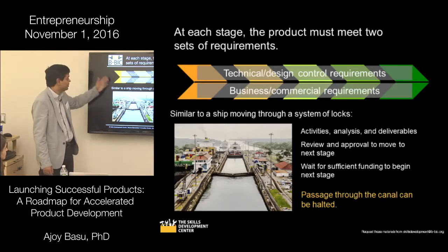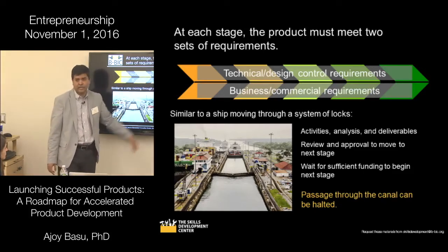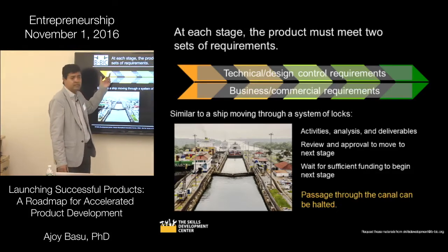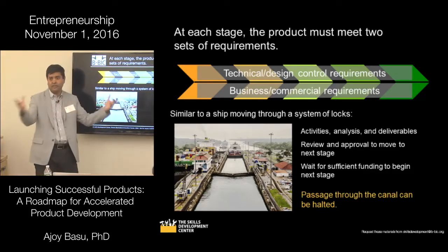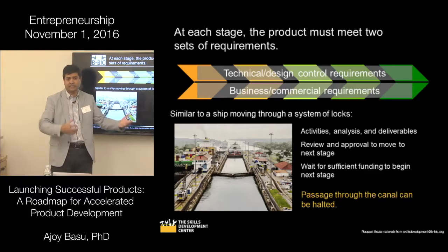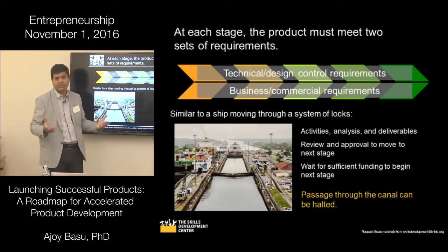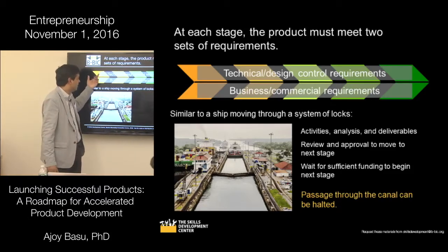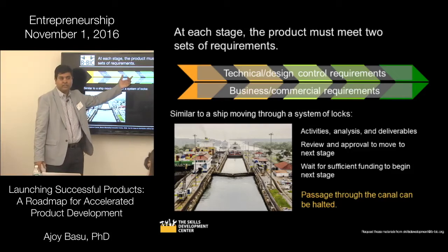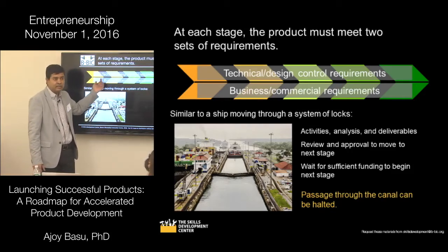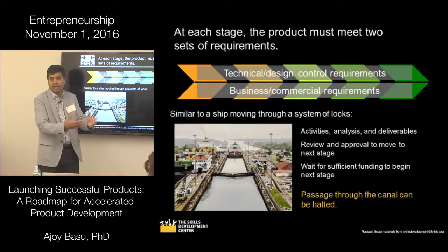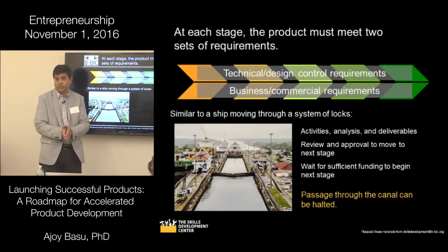Okay? So using this stage gate approach, what happens is that product development has marketing, engineering, manufacturing, regulatory, many different functions. You don't go forward when 5 out of the 6 functions are ready and engineering still has some issue that they need to resolve.